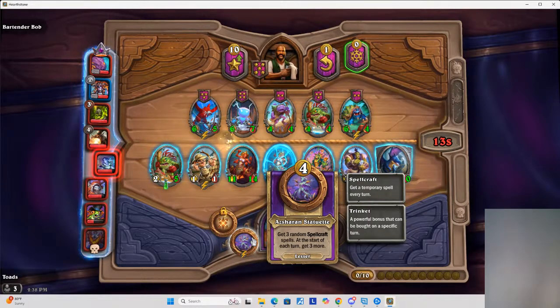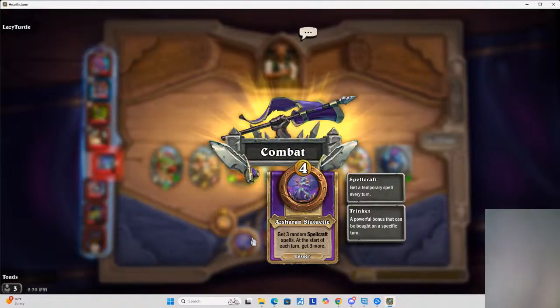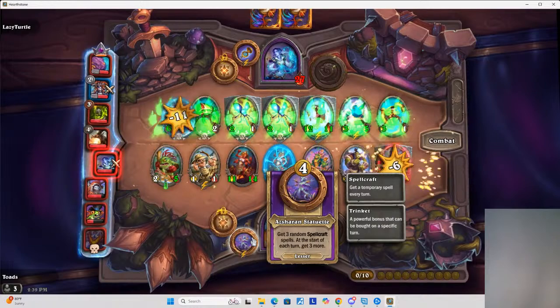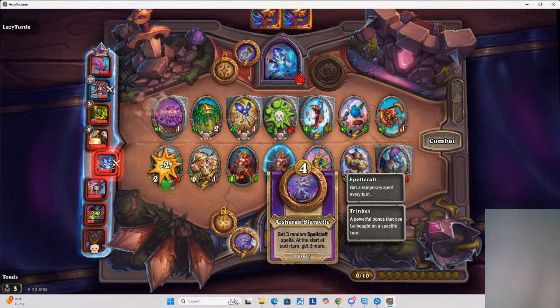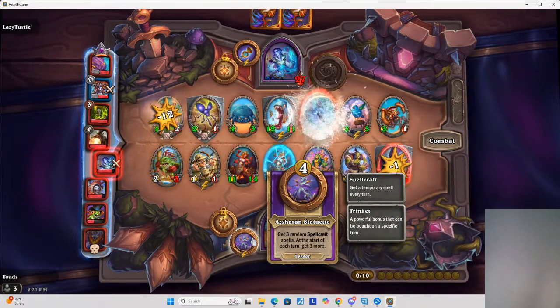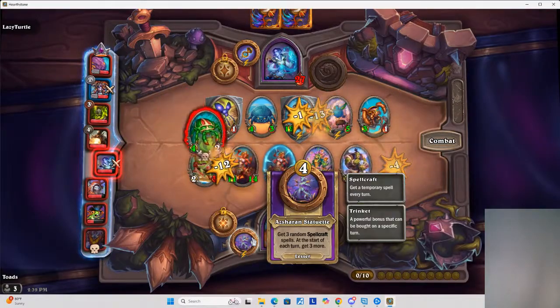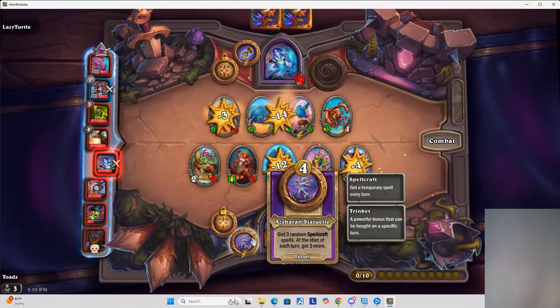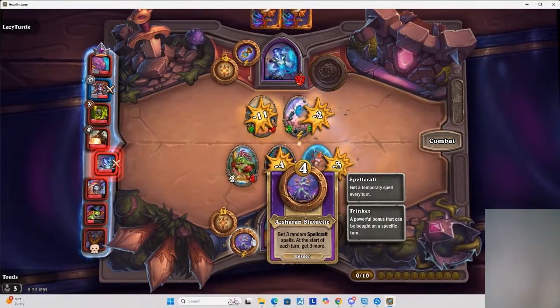A third technique is to ask the customer to choose between two of the constraints. For example, you might say, "Hey Beth, if we had more money, finishing the project in May is more likely." Or ask her whether she would rather cut scope to stay under $30,000 or complete the full scope even if it costs more. Another trade-off could be to reduce the initial scope to move into the space in May. Practice identifying the most important constraint with a project you're working on. Ask why and make a list of what-if scenarios to help clarify what's important.